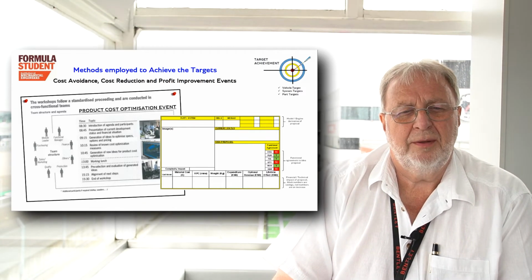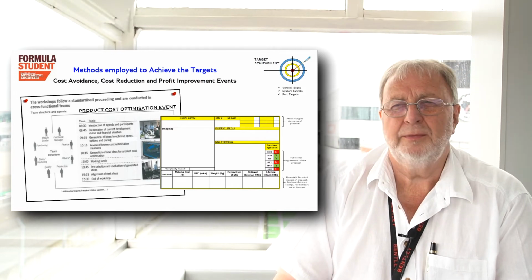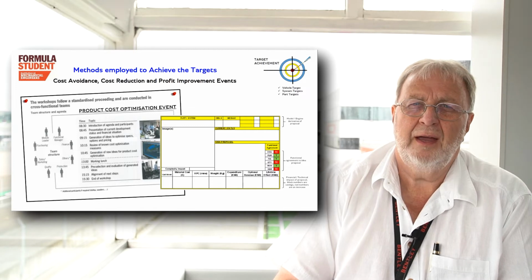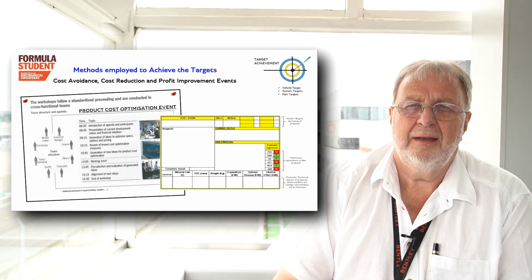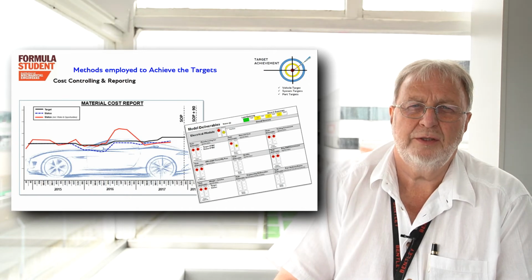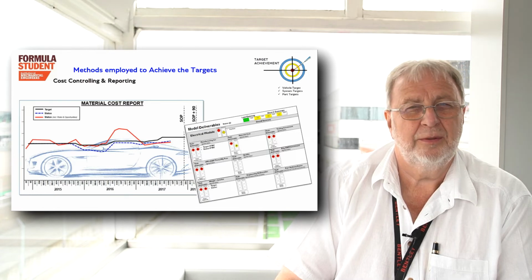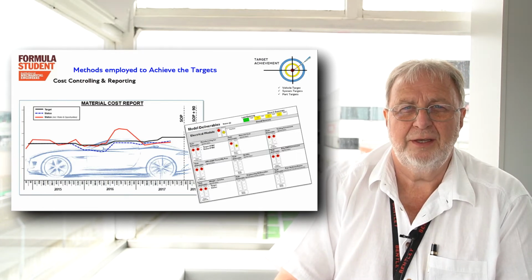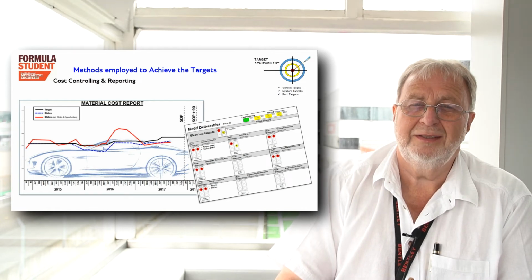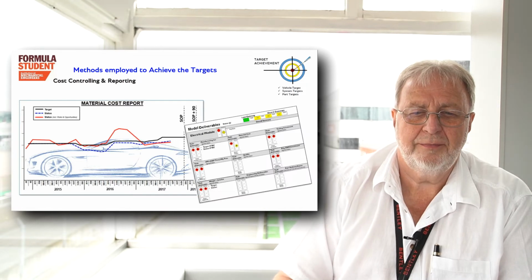When you're looking at your suppliers' quotes, and they'll come in different formats, sometimes it's just a single line item. Don't be afraid to ask, how has this price been derived? How is it being calculated? Particularly if it's a bespoke part that you've put out for quotation, you can challenge what they've quoted for you, and you will more than likely get money off just by asking without delving into any more detail. But delve into that detail, because you'll be amazed how much money you can save.